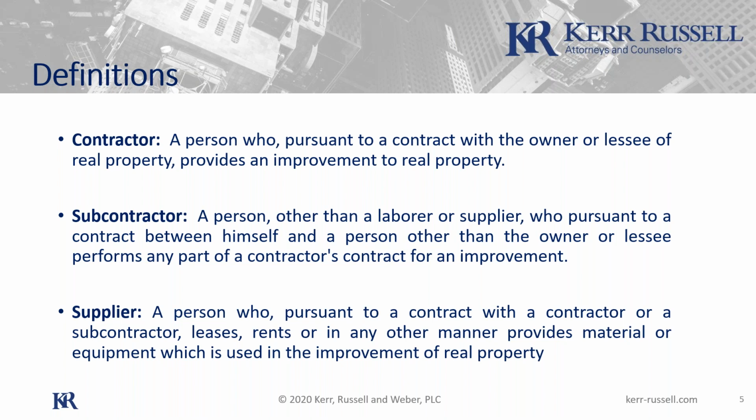Those are public, but it does affect your bond rights, which are kind of similar to lien rights in terms of this tier discussion, whether you're in direct contract or not, can affect your rights. And so that's kind of the point I want to make about this. The main thing I would take out of this is, as to whether you're defined as a quote-unquote contractor, is whether or not you have to give your notice of furnishing, or on the bond side, whether you had to give your 30-day notice under the bond. And if you're in direct contract, you don't have to give the notice. But in all other times, in the more typical scenarios where you folks are one tier removed from the owner, where there's a general between you and he's the person that has the direct contract with the owner, then you do have to give the notice of furnishing.